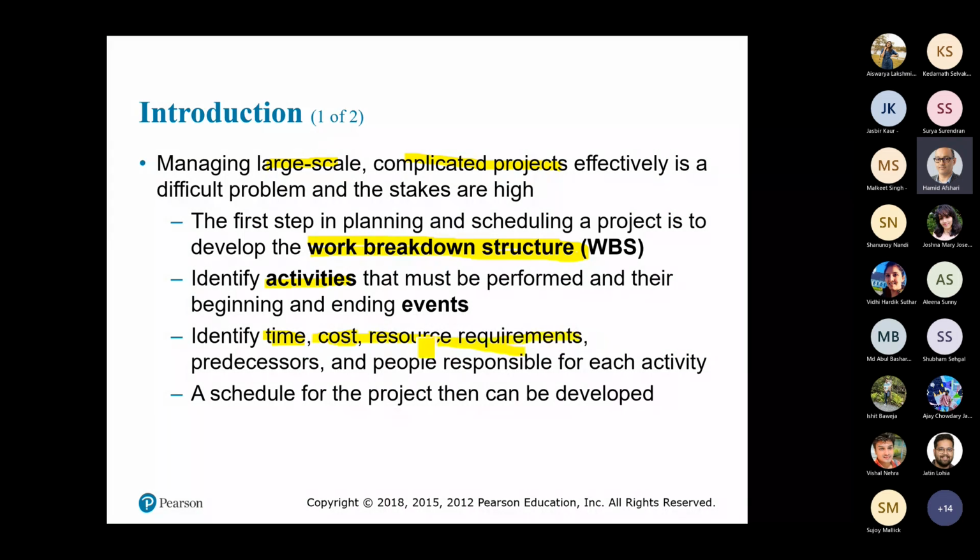So for example, if you want to purchase, you need to use a bus, for example, to go for shopping, or you may need gas for your car in order to drive to any shopping center. Predecessors, so these are activities that are coming before and after an activity, so the sequence of activities. So it's very important. Without considering predecessors, you will fail a proper scheduling of activities.